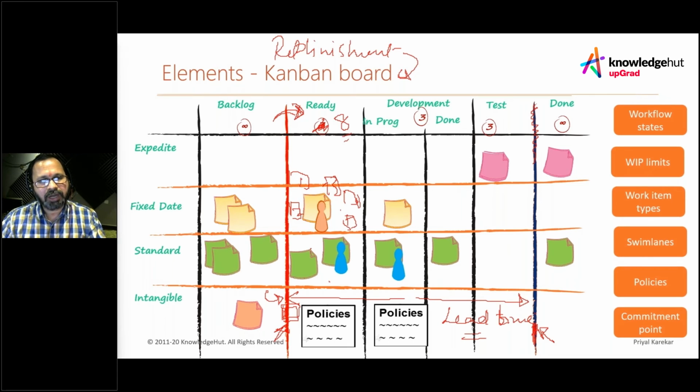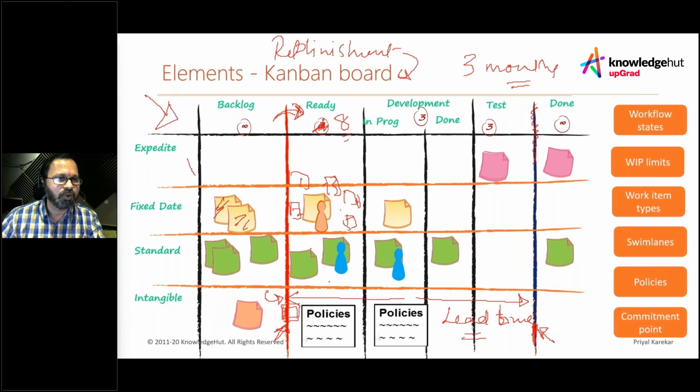But if you're not using this kind of technique to manage, what the customer feels is, the moment he has given the work to your PO, and the moment it is there in your backlog, he thinks the work is started. And then he says, okay, you guys take about 3 months to deliver even the smallest thing, because everything is falling in the backlog, with constantly changing priorities. We do not know what to do, and he feels that just because he has given it, and all of these items are part of the backlog, it means that we have committed to it. It is not like that. The moment we pull here is when we are actually committing and starting to do the work, and now only are we able to answer, and we need to measure our performance from this lead time.